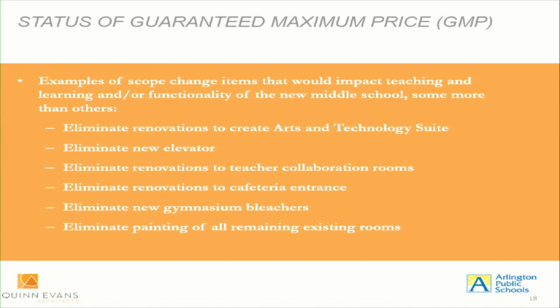I will say that value engineering on this project was extremely difficult because of all the constraints that we had. Unlike Wilson and Fleet, it's an addition. So the changes that we make within the addition, there's an economy of scale that we couldn't quite get to, like we had on the other projects. And there were other constraints around the site and the other approvals that made it very difficult to review those items.